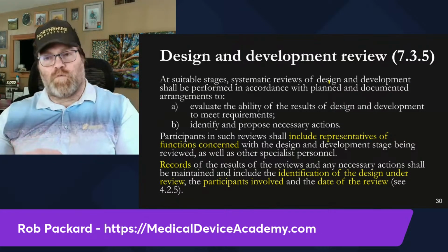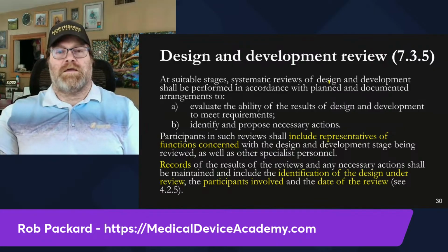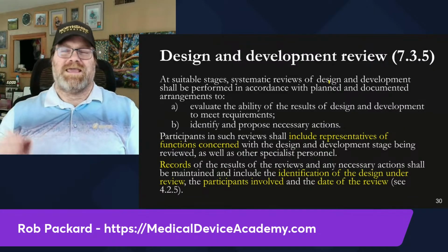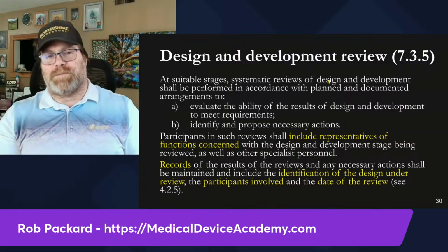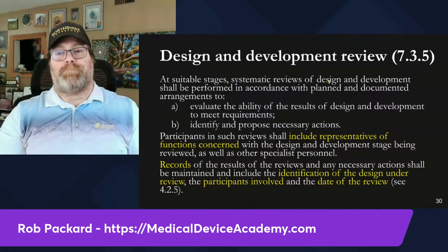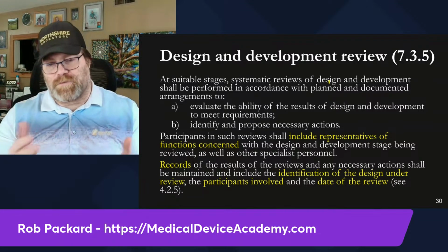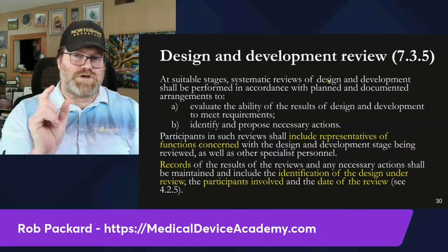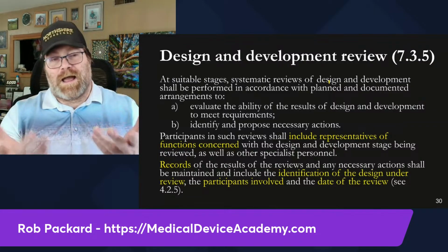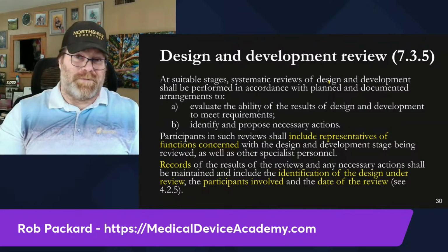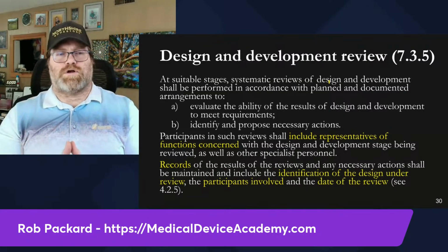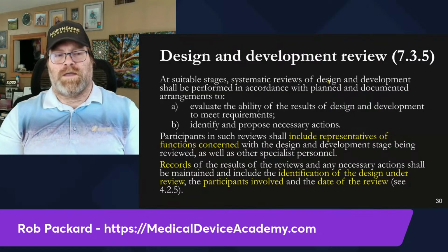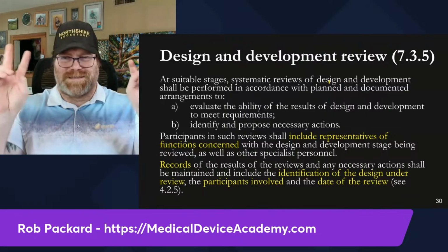And then I'd have one more that says, are we ready to launch the product? If you wanted to insert one more, it might be, are we ready to submit to the regulator? Because that you don't want to screw up either. But that would be a very short review. And I typically do that for clients within a couple hours. So it's not a big activity, and is a lot smaller group for that particular review. And I'm not sure I would call that a design review.